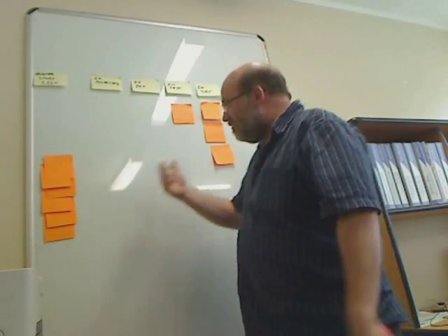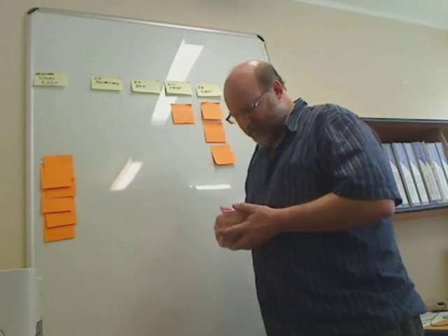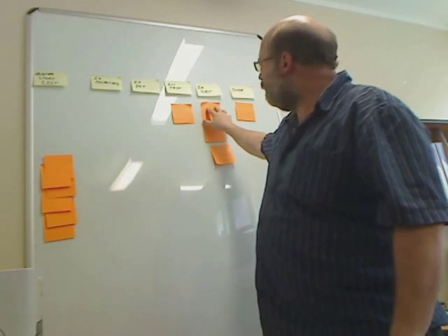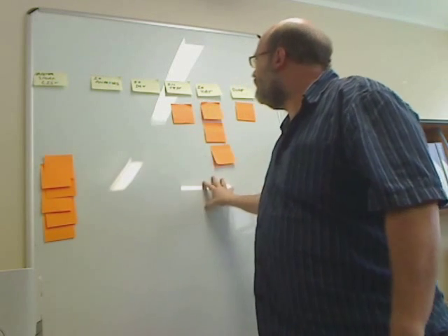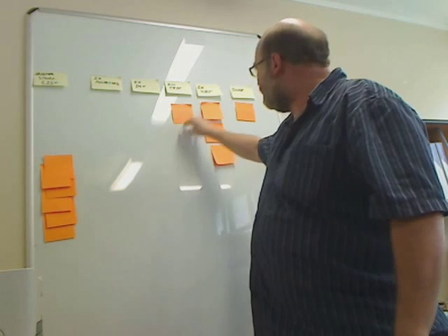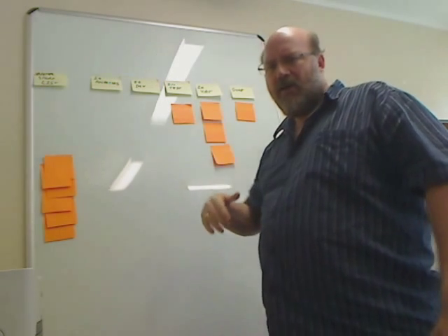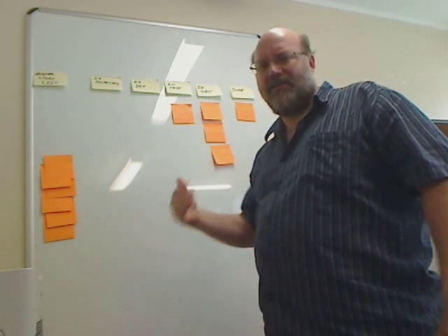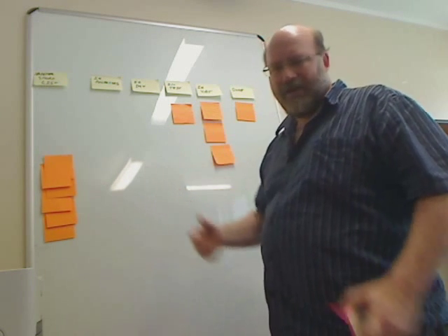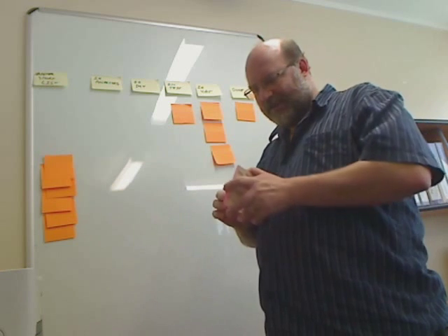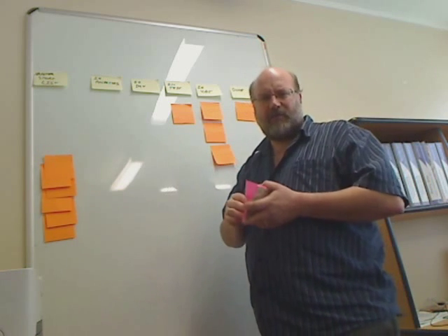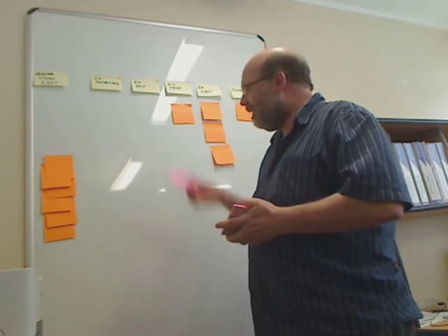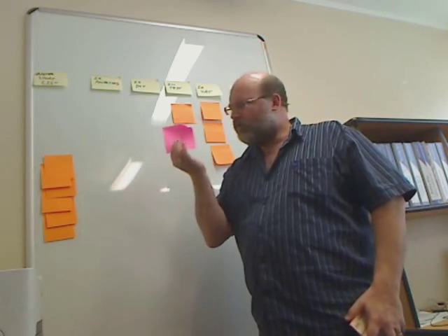Another not uncommon activity is what happens if, during one of the testing cycles, either the tester testing or the acceptance testing, we find a problem that is not related to this particular iteration. It's a defect from some technical debt that has built up, a hangover from a previous iteration. In that case, we raise a new story.